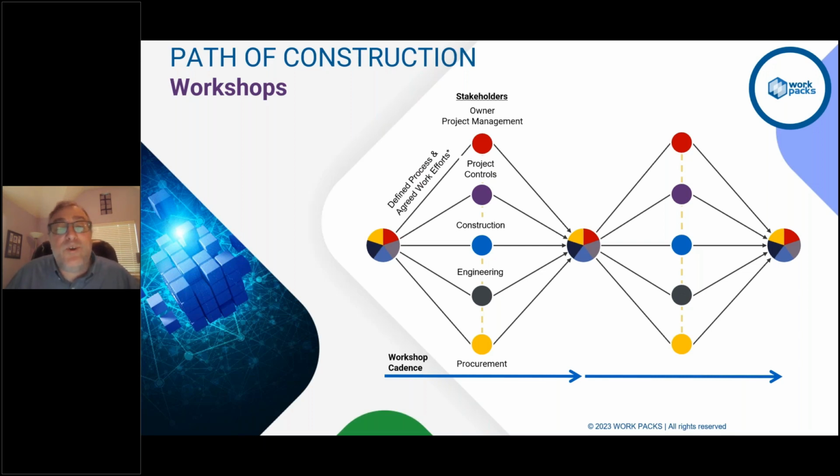And you have to assign people to do the work for this. And these are facilitated sessions, right? But you want to go into these sessions, the interactive planning workshops, prepared, right? You want to have the necessary technology, you want to have the roles defined, the team roles, and you want to have people prep their portion of it ahead of time, right? So once you do one, people go away, they continue on, it gets updated, but you bring it back together, right? So the accordion type of model and updating things as you go along, and really having this as a way that you can define things, in terms of the deliverables here, and creating that master AWP index, the CWP release plan, and the EWP release plan, right? So getting all the stakeholders together to march that forward and setting up that cadence.